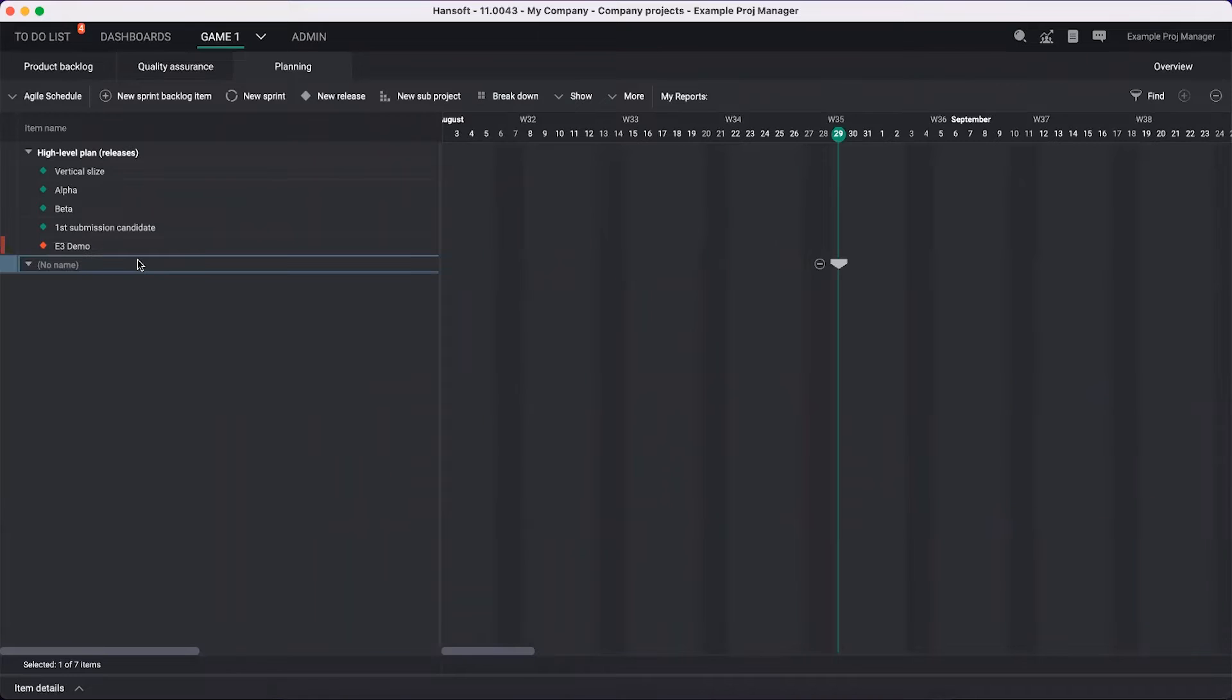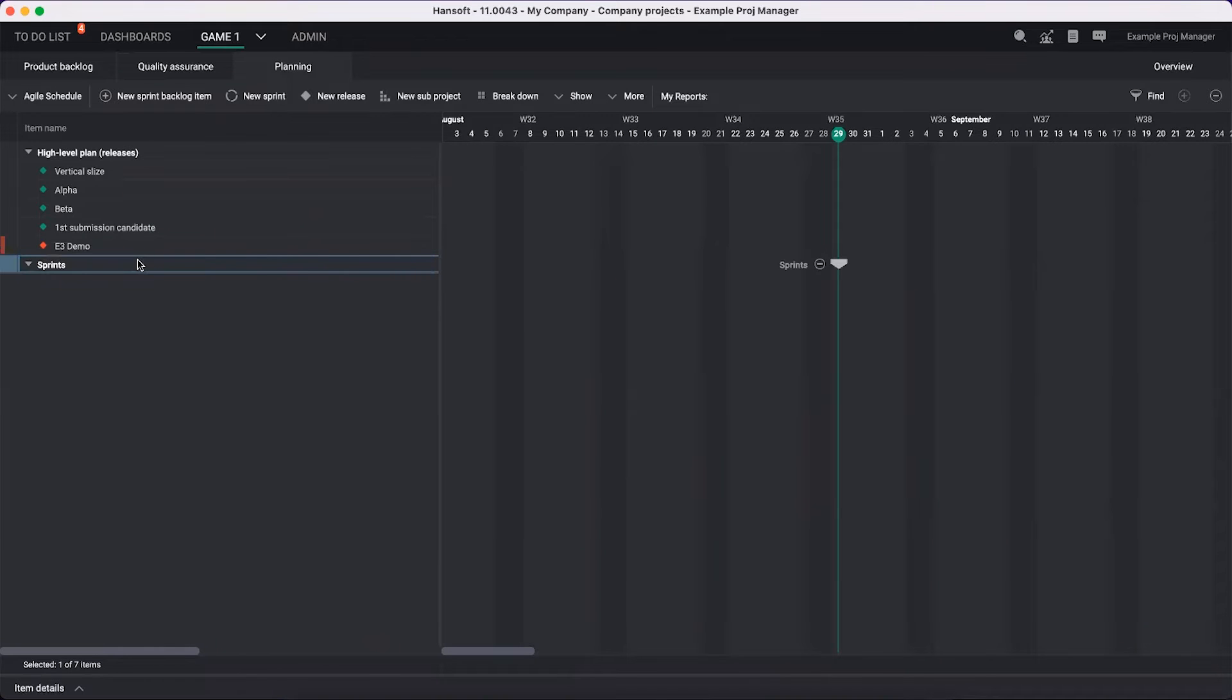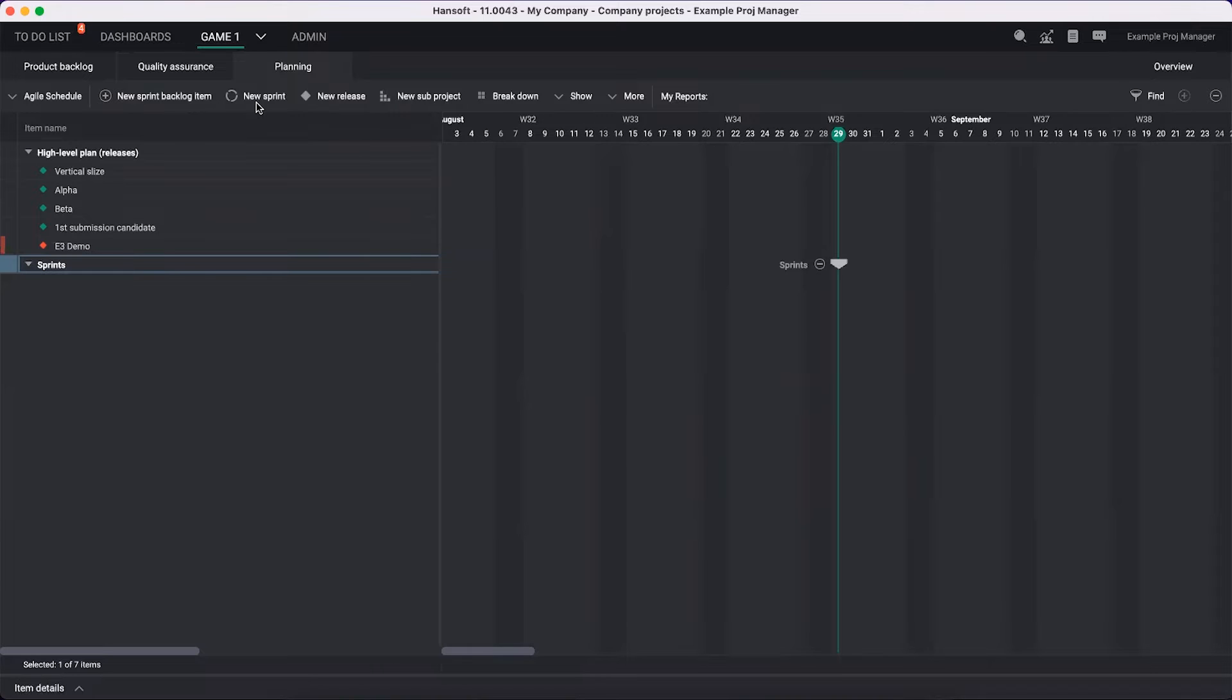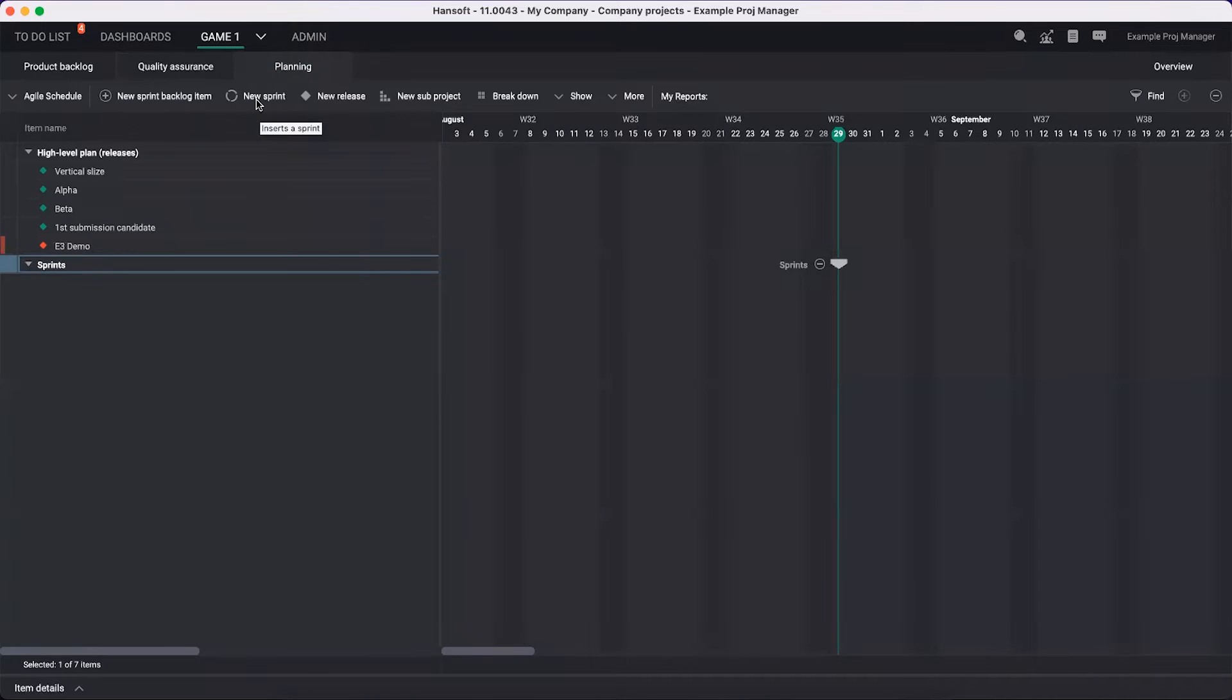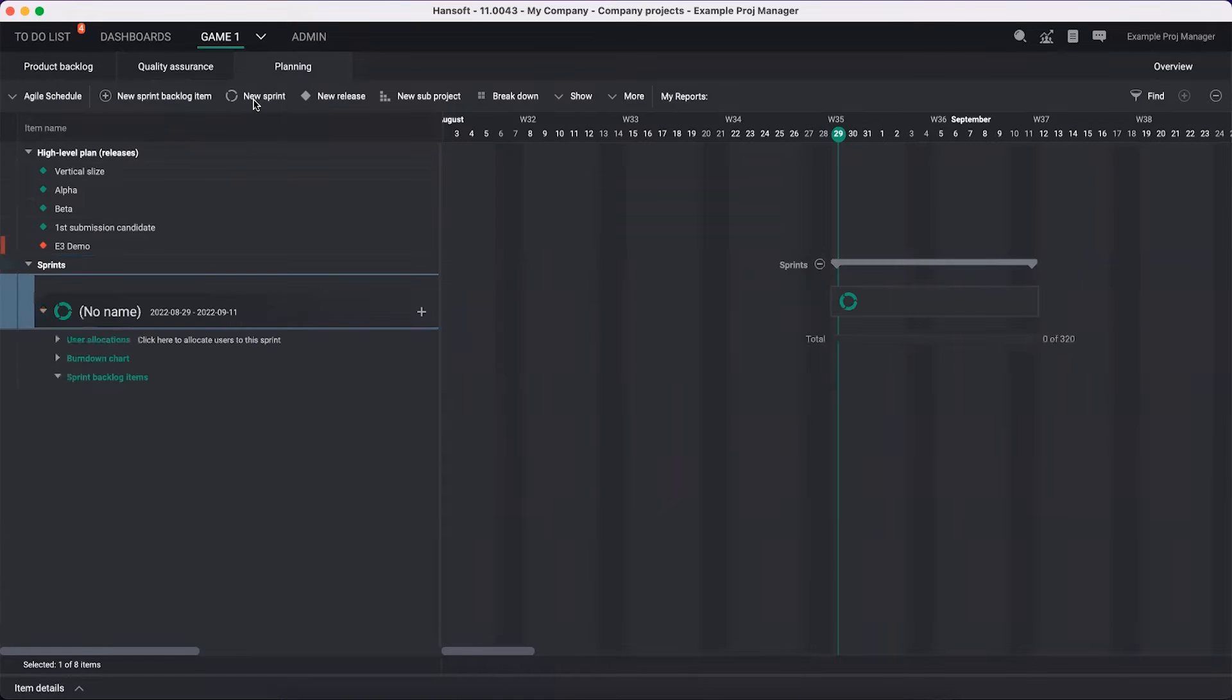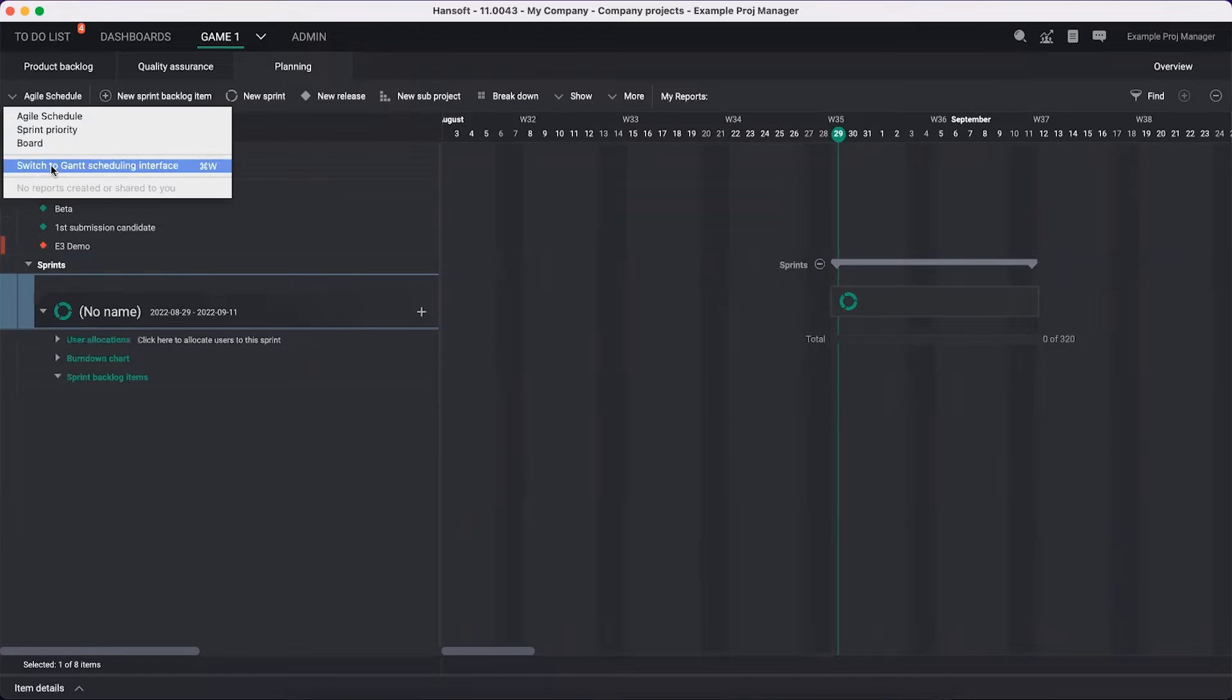I could also right click and add it right here. I will call this one sprints, because this is where I'm going to put my sprints. This is a way for me and this team to do short iterations of work - two weeks, probably at a time - where we try to make as much progress as possible and have a retrospective after each one to review what we've done, how we can improve. In projects with a lot of unknowns, that's a great way of getting started with planning in Hansoft.